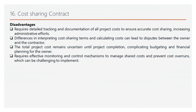While the cost-sharing contract encourages collaboration and shared responsibility, there are notable disadvantages. Complex tracking and documentation: this contract requires detailed tracking of all project costs to ensure accurate cost-sharing, increasing administrative efforts. Risk of disputes: differences in interpreting cost-sharing terms can lead to disputes, potentially affecting project timelines and relationships. Uncertain final project cost: the total project cost remains uncertain until project completion, complicating budgeting. Need for robust monitoring: effective monitoring and control mechanisms are essential to manage shared costs and prevent overruns.